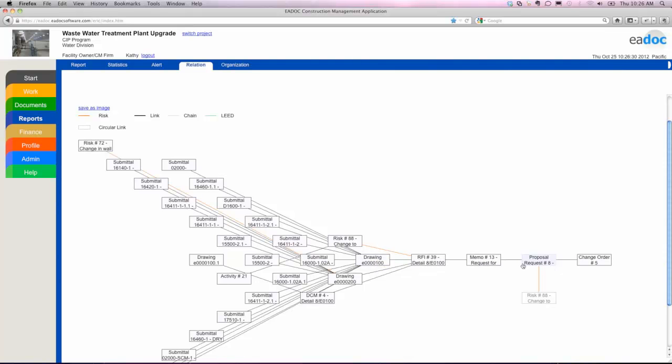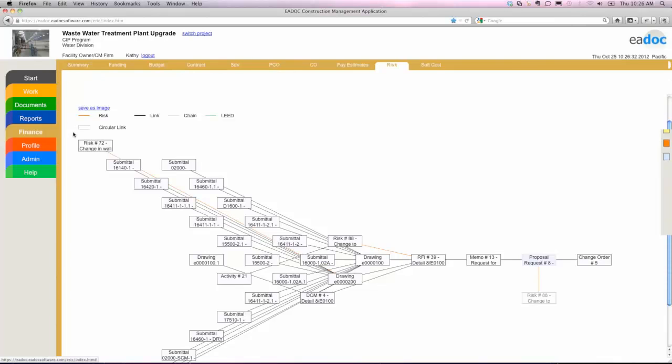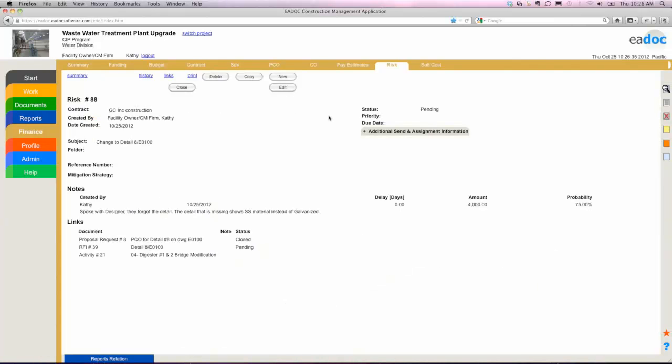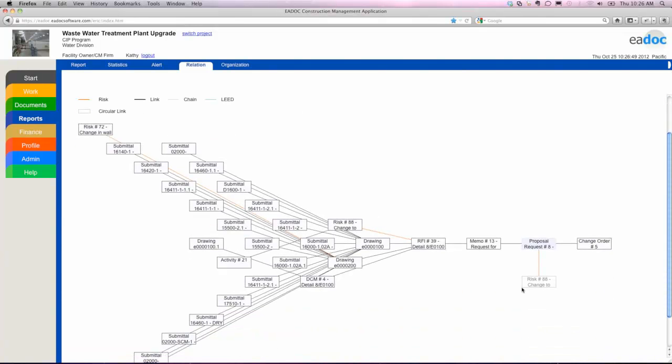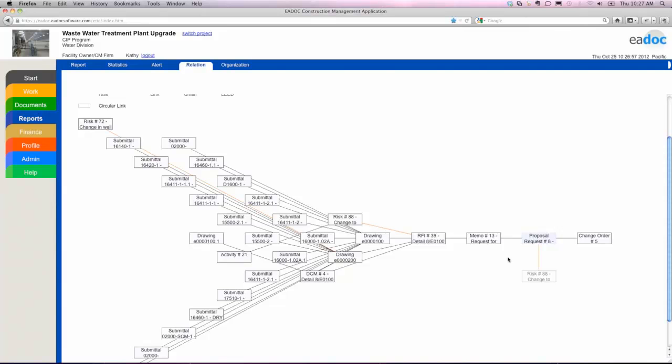How do I get these relationships up here, the proposal request? This is done through your project managers, managing the project, managing the risk and the issue items on that particular job. Talk a little bit about one of our clients, East Bay Mud, who has a challenging project on their hands. And what they're doing is with every single change order that they turn over to their legal counsel, currently their counsel has to review every change on the job, they're providing a copy of this relationship diagram. So this is that story that they're handing over to their legal counsel that says, okay, here's all the documentation for you, all the backups, all the electronic PDF files, and then here's the relationship diagram that goes with it. And so this way it gives their legal counsel a head start in terms of evaluating how they ended up at that particular change on the job.